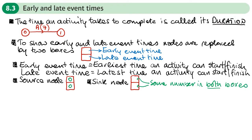In the source node, the two numbers in the boxes will always be zero. And in the sink node, these two values will always be the same.